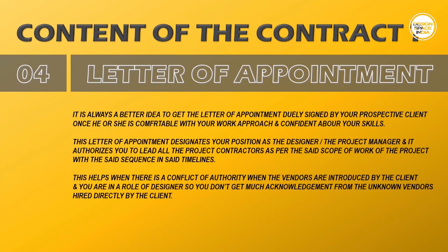A letter of appointment signed by the client will provide the authority to lead the project, as it designates the position of the designer to take any crucial site decisions. In case the client has hired unknown vendors, there is a chance that those vendors do not acknowledge the authority of the designer. The letter of appointment provides that significance of authority to the designer.